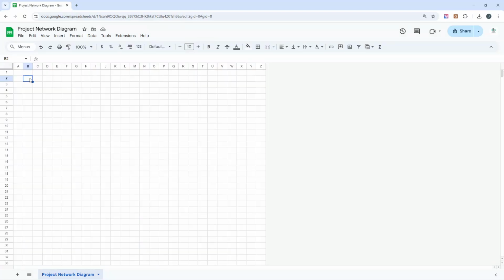Once you've done that, we're going to start building out the nodes from B2. Now, as I say, I do have an explainer video which will walk you through what a node is and what all of these different acronyms stand for, but I will mention them briefly just so you understand what we're doing in this video. So in B2, the first thing I want you to put is ES. Now that stands for early start. This will be the earliest date that the task can start. And we're going to be building out a node for each and every activity in the project. So just bear that in mind.